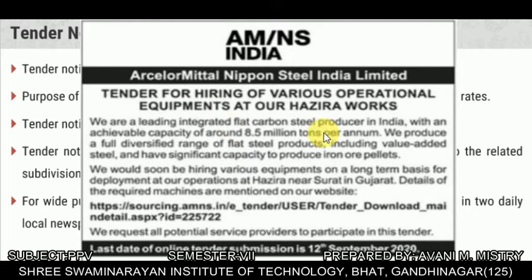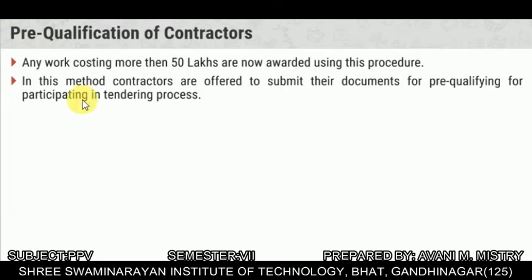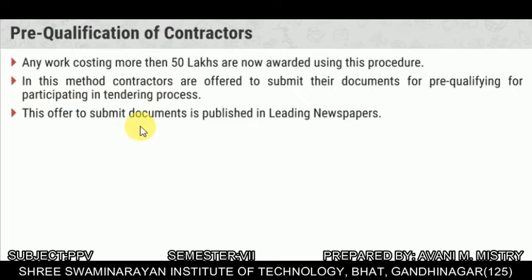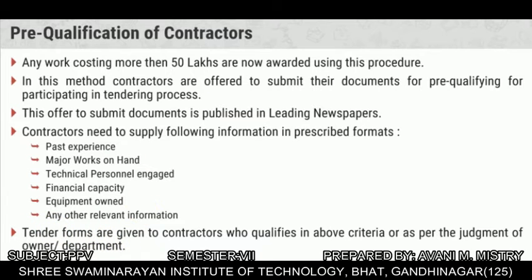Pre-qualification of contractors: for any work costing more than 50 lakhs, this procedure is adopted. Contractors are required to submit documents for pre-qualifying for participation in the tendering process. Technical personnel credentials are given to contractors who qualify in the above criteria as per the judgment of the owner or department. If the cost of the work is very high, fewer contractors will qualify.